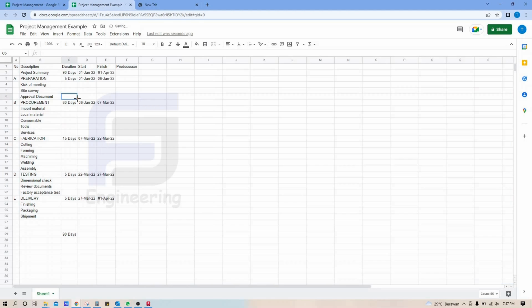We can guess the duration for each process. Kickoff meeting we need 1 day, site survey also 1 day, and approval document we need longer, 3 days for example. And then for import material we need 60 days, local material 30 days, consumable 30 days, tools 14 days, and services 14 days.